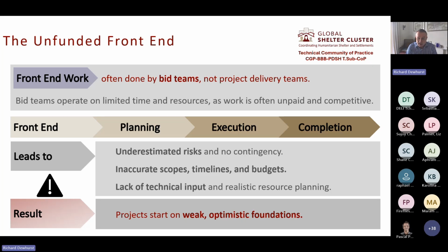And therefore the time allowances and budget estimates tend to be inaccurate. And the scope is generally loosely defined because the detailed design hasn't been developed yet. So the lack of technical and construction input, combined with the limited funding and time, means that the project begins on an overly optimistic and weak foundation, which can have implications throughout the project lifecycle.